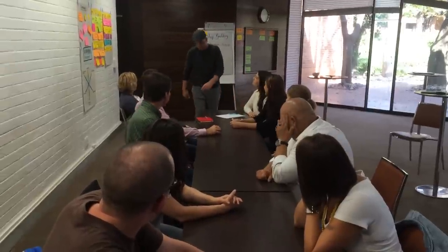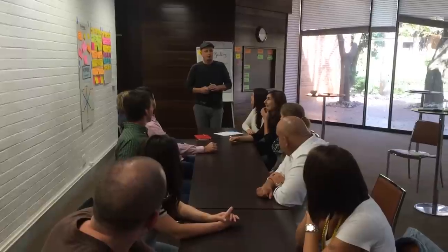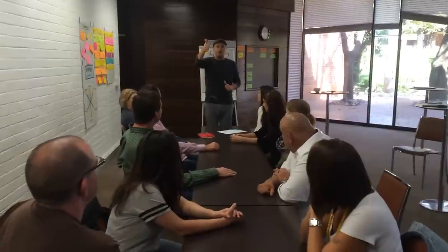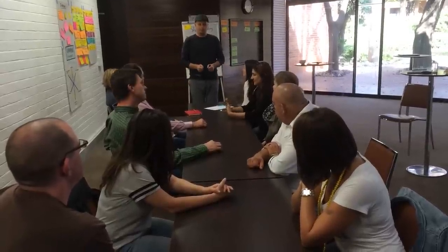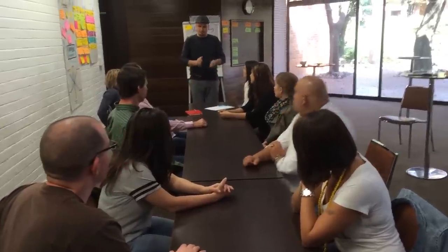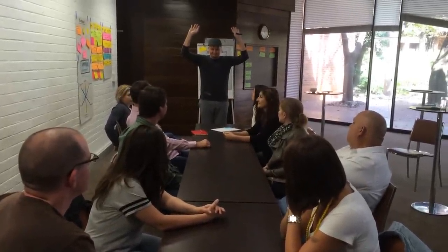And now we are changing some of our policies, okay? We don't want to do push anymore, and we will limit our work in progress. We limit the work in progress in each and every activity by one. This means you have a working area in front of you, and in this working area there is always only one ship. You do your activity, and then we switch from push to pull. You leave it in your working area when your step is over, and then you signal that you are done by putting your hands in the air.